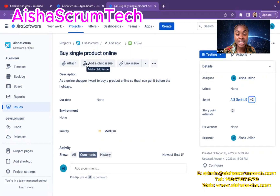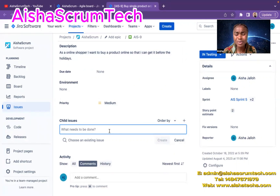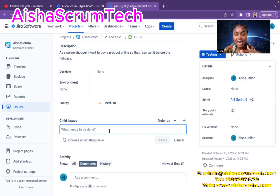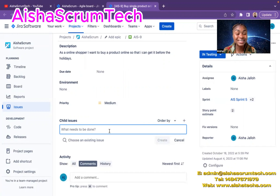I'm going to click 'add a child issue.' The parent story is: as a shopper, I want to buy a product online so that I can get it before the holiday. Before I create this sub-task, let's talk about why team members use sub-tasks. Sub-tasks are sometimes written down for the developers themselves — whereby they have the complete user story but, for their own tracking purposes, want to know step-by-step how they will do the work. Developers will have their own sub-tasks, and QA testers have their own sub-tasks, all linked to that same story.